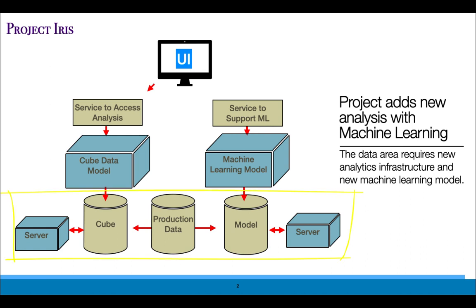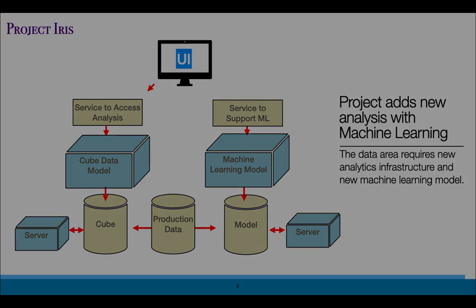The next component is infrastructure. The DataCube and the machine learning components can demand a lot of infrastructure. If the infrastructure is demanding, we'll need a separate effort to procure, set up, and configure that infrastructure. And finally, we'll need production data. That production data will need to be available to the analysis team as well as the machine learning team.